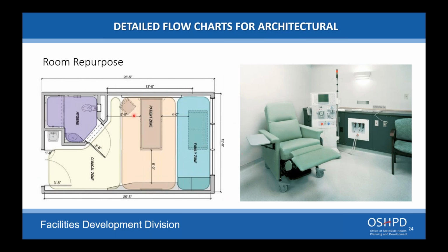Okay, we're assuming everything's going to be demoed out, and the new stuff's being put in. So your requirement is within the walls. Now you do have new plumbing that may go in, new electrical. You may even have to adjust the air exchange changes per hour, the air volume coming into that room, new finishes, etc. Your scope of work is limited to that room.